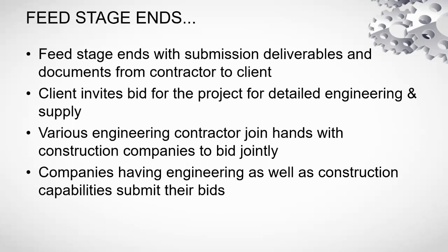So at the time when the client starts inviting bids for this project for the detail engineering phase, FEED is expected to be at least 90% completed. The detail engineering contractors, remember, we are talking about millions or probably billions of dollars of investment.